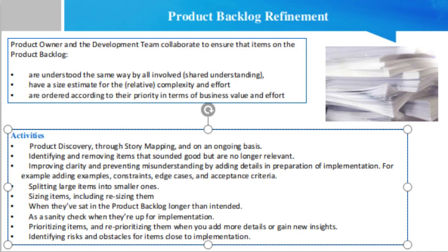Invest in a definition of ready. Similar to a definition of done, a definition of ready helps you to detail user stories to a consistent level. It specifies what a user story needs to include before you will accept it for implementation in a sprint. For example, the objective of the item, how it will help a customer or user do their jobs, the business value it will provide as determined by the product owner, and an estimate of the complexity and effort required.